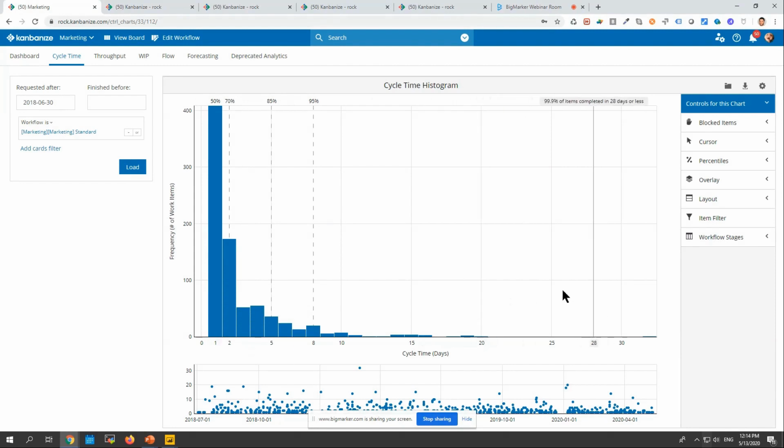Obviously, this here on the right, we call it a tail. Obviously, the longer the tail is, the worse, because it means that a work item can be done anywhere between 1 and 32 days. And if you're doing something that's supposed to be finished in 10 days and you happen to finish in 30 days, you're not very excited about it. So a good thing here on this chart is to try to shorten this tail on the right.